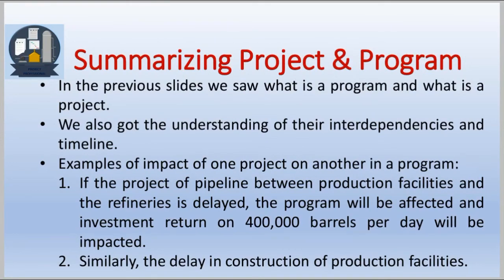Summarizing project and program: in the previous slides we saw what is a program and what is a project, and we got an understanding of the interdependencies and timeline. As an example of the impact of one project on another in a program — if the project of pipeline between production facilities and the refineries is delayed, the program will be affected and the investment return on 400,000 barrels per day will be impacted. Similarly, this is the case for a delay in construction of production facilities.